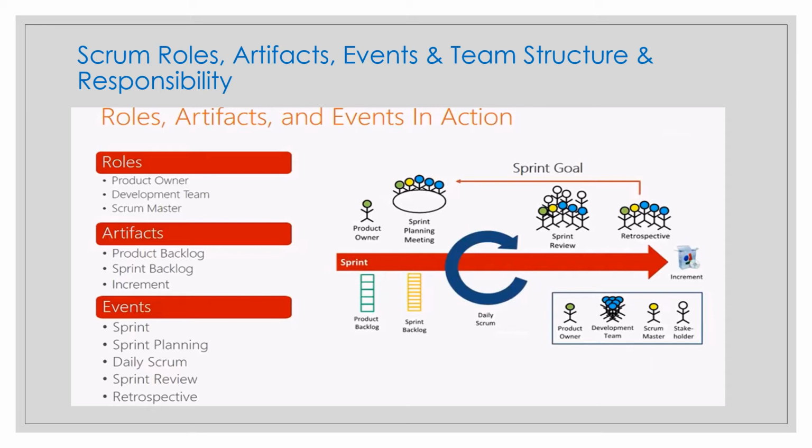So when a sprint horizon is too long, what happens? The sprint goal may become invalid. Why? Because complexity may increase and risk may increase, and then it will endanger your sprint goal. If the sprint is shorter, then complexity will be less, it can be resolved, risk may be less, a mitigation plan should be there, and your goal can be achievable. So shorter sprints can generate more learning cycles and limit the risk of cost and effort to a smaller time frame. Each sprint may be considered a short project only.